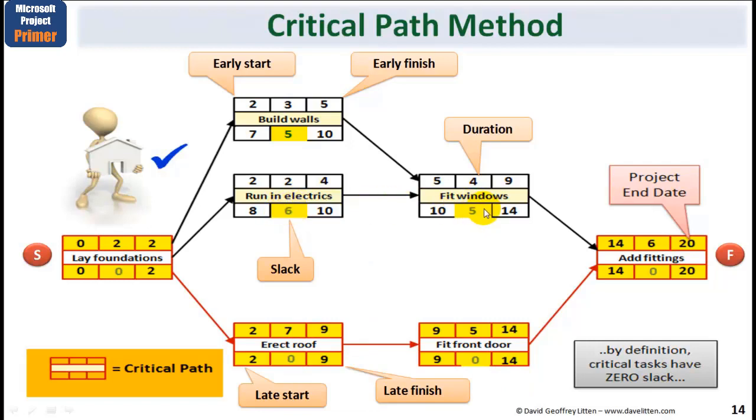What this means here is that this task could start, and hence finish, up to 5 days later than the plan, and still the project would finish on time.